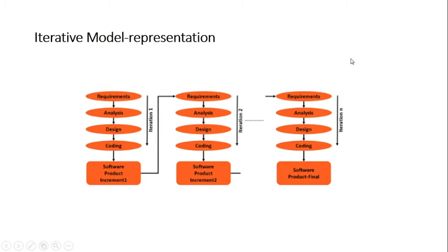So understand this way, the entire software is not developed in a single iteration like the waterfall and prototype models. We are developing different iterations having different sets of modules. Now the second feature is we are using the iterative waterfall approach in each iteration. The third thing is that each iteration is fully functional in itself, standalone.